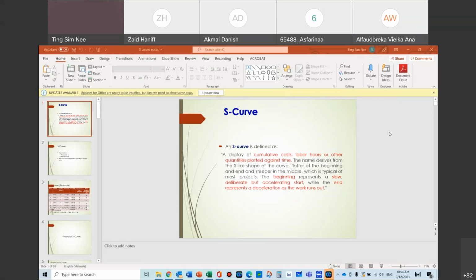Then for the more detailed one, that is all up rate. That one you have work breakdown, with quantity there. Quantity is fixed already, but you don't know the flow of work of how the thing will be constructed on site, because different contractors will have different mentality and different numbers of resources and all that. So if you want an estimate, you come up with an all up rate. And the all up rate will be very standard, to do that particular work.